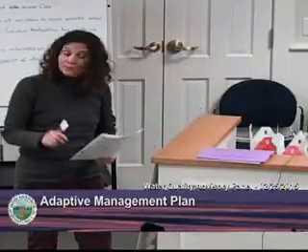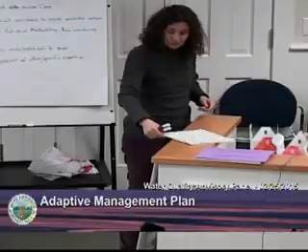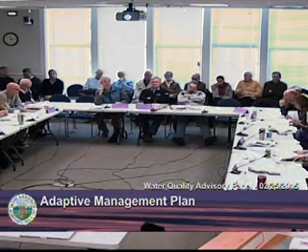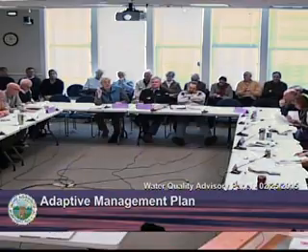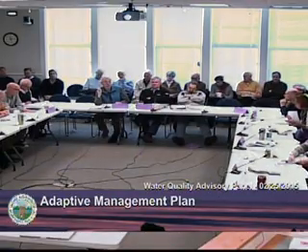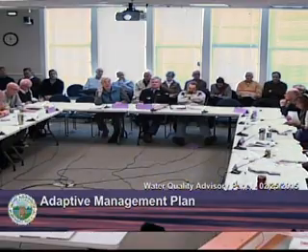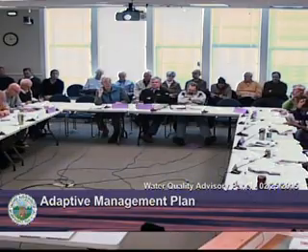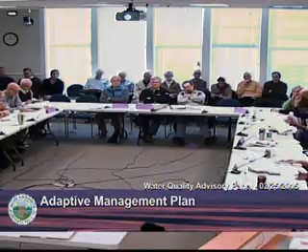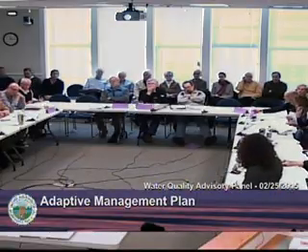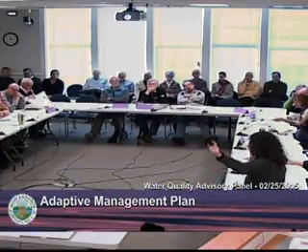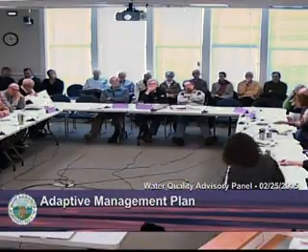Stacy, I wish you would add to the chart over there regulatory review and approval for all the things that Jeff and others raised here. It's Cape Cod Commission, it's DEP, and ultimately EPA, DMF. They are the ones that are going to say, okay, your protocols are acceptable or not. And we need to know that before we start spending money. Yeah, and right now the warrants really do the best job of outlining next year's tasks. We have to make sure those are reflected in the Gantt chart for next year's work. So we just have to do that coordination better.